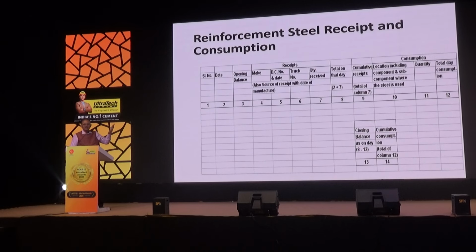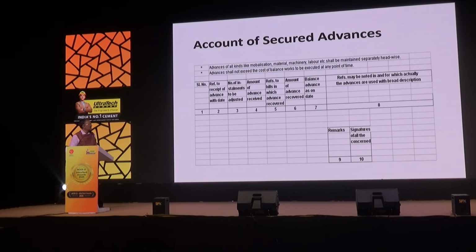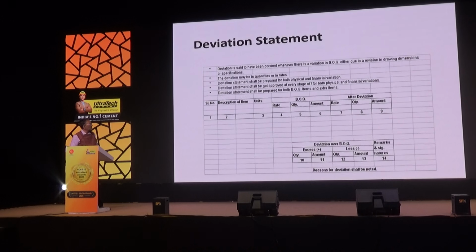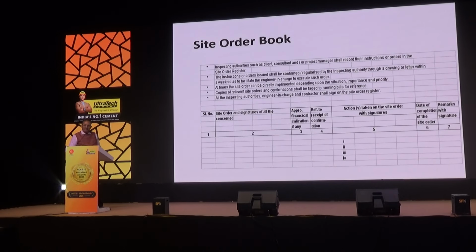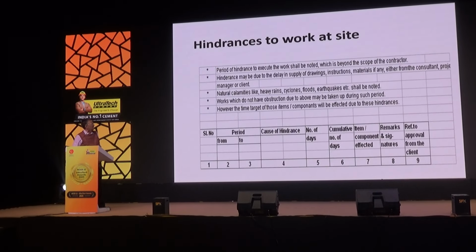Like a good doctor, a good engineer can give a solution with these registers. This is not my invention; I have been following it for the last 28 years. It helps every engineer very well if you follow these quality registers, in quality assurance, quality control and quality audit. Whenever I go to site, I make it a point to sign these registers. If my engineers are not updating, I write that you are not updated. That is my quality audit procedure. It protects engineers if we follow this method.